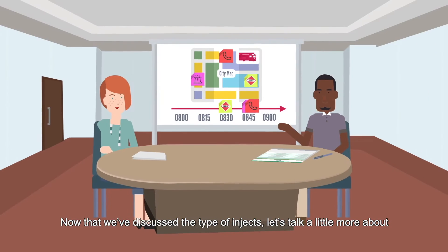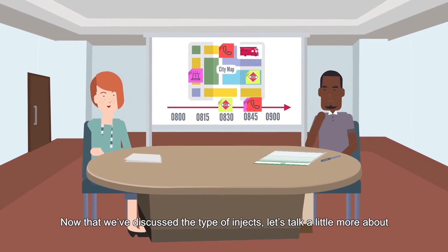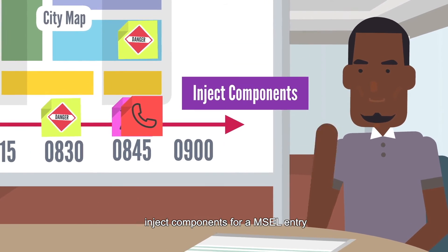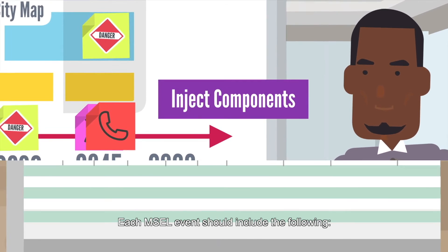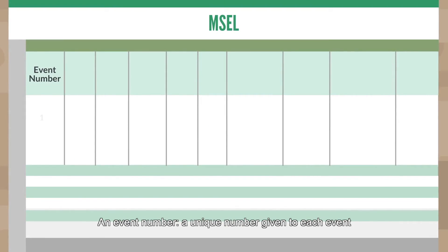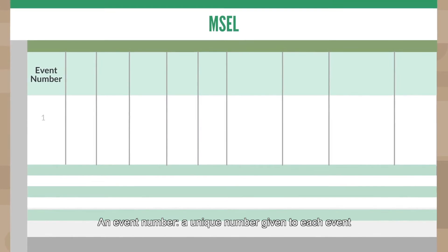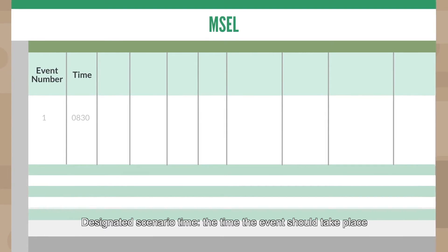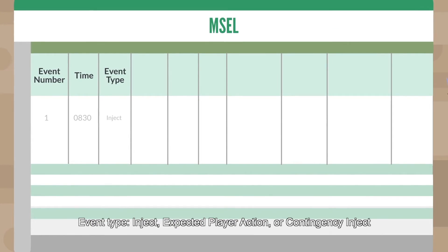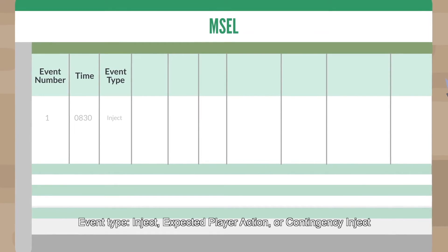Now that we've discussed the types of injects, let's talk about inject components for a MEASL entry. Each MEASL event should include the following: an event number, a unique number given to each event; designated scenario time, the time the event should take place; event type — inject, expected player action, or contingency inject.